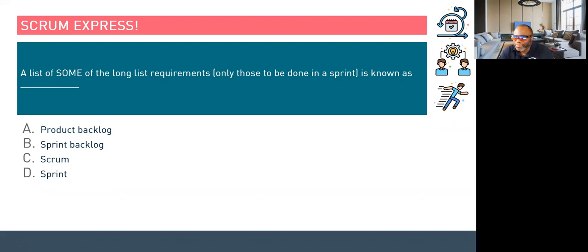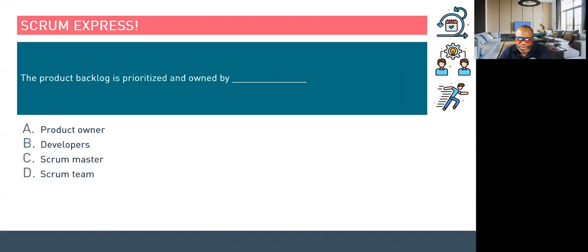A list of some of the long list requirements, only those to be done in a sprint, is known as what? All righty, 3, 2, and 1. End the poll. Awesome job. The answer to this is indeed the sprint backlog. The sprint backlog is a list of some of the long list requirements, those to be done in the sprint. Here's your next one. The next question reads, the product backlog is prioritized and owned by...